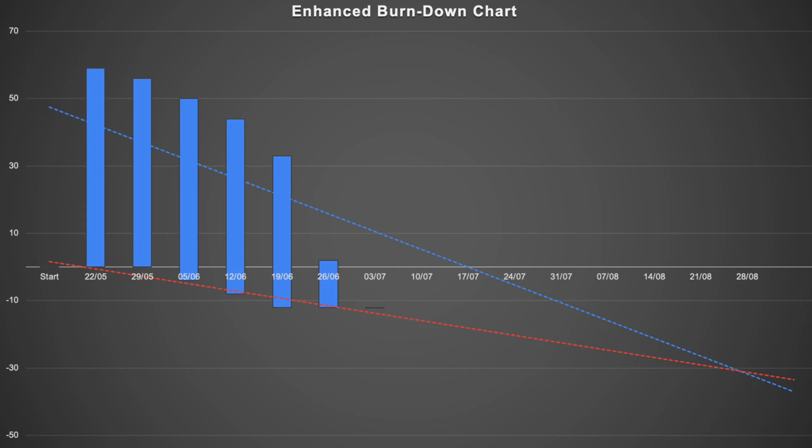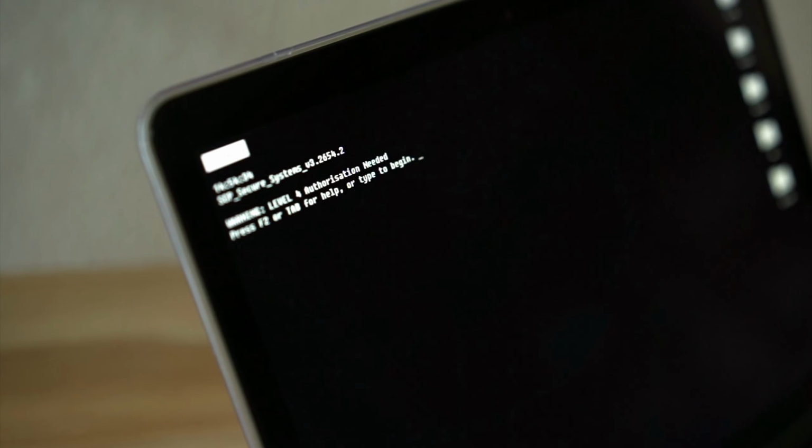By adding trend lines projection to the chart, there can be seen another level of prediction that allows defining time by when the actual backlog would be covered with the current task completion velocity, in a place where 2 lines cross. The final metric that brings clarity to the workflow prediction is cumulative possibility.